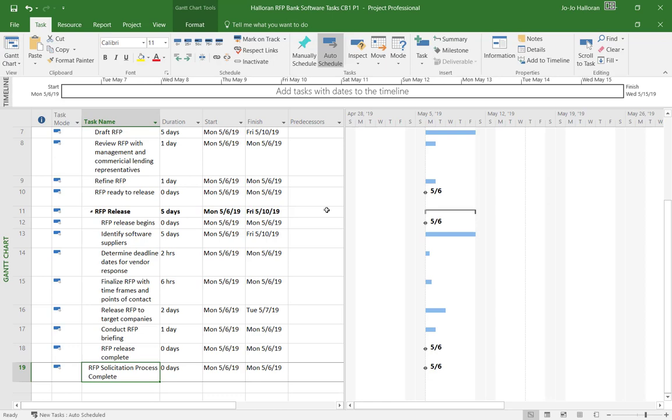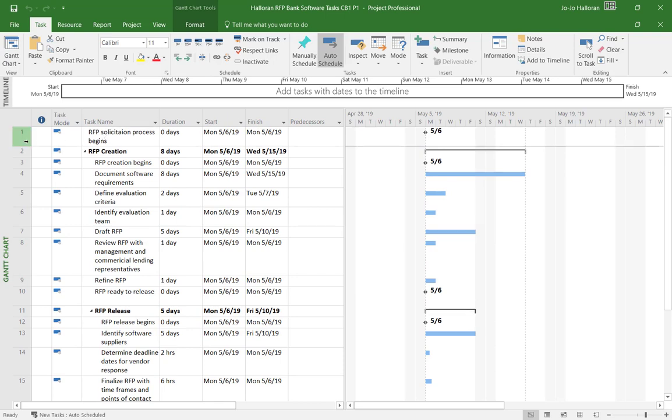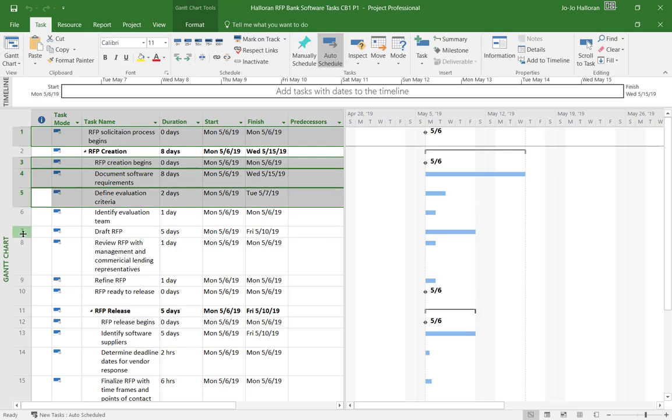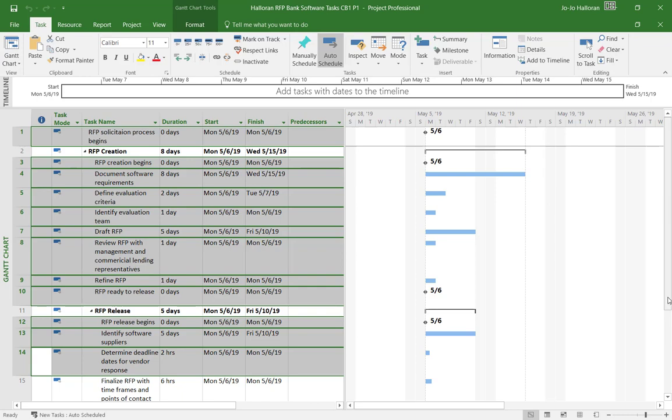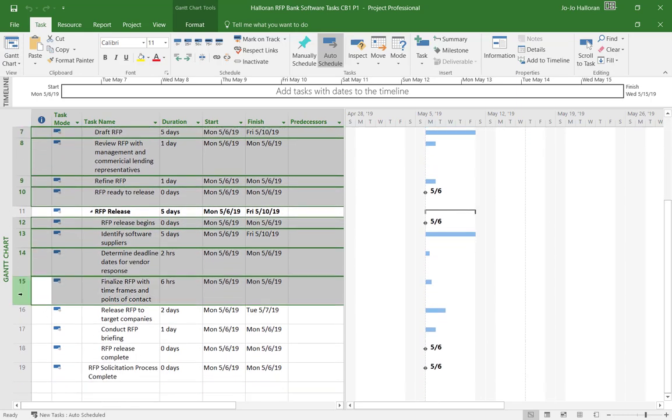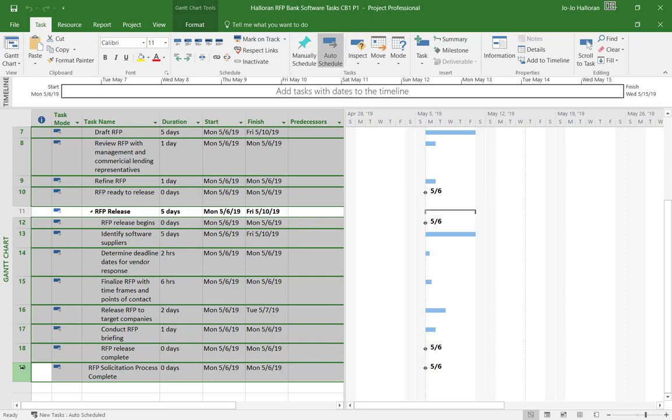Okay, so now let's go ahead and click on the little save icon just so we don't lose the work that we have done. And we're going to select task 1. So let me go back up here and grab number 1 by getting my little right-facing arrow. And then we're going to select 3 through 10. Remember that you can use Control on your keyboard and select all of these here. And then it also says 12 through 19. So I'm going to continue with my Control, scroll down a little bit and continue selecting, holding the Control down all the way through 19. And we're going to link them with a finish to start relationship.